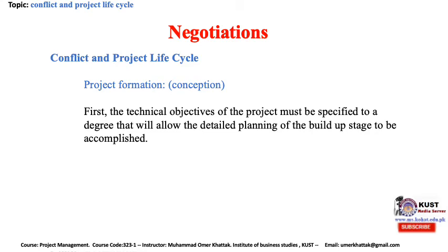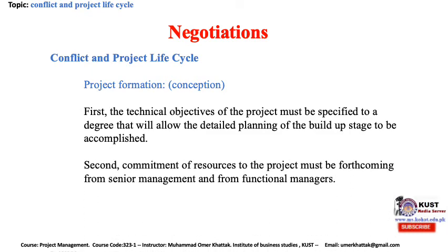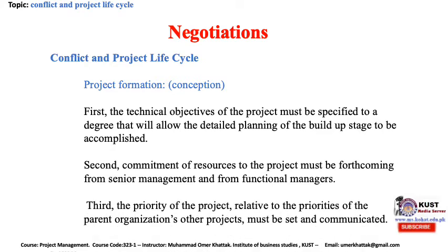First, the technical objectives of the project must be specified to a degree that will allow the detailed planning of the build-up stage to be accomplished. Second, commitment of resources to the project must be forthcoming from senior management and from functional managers. Third, the priority of the project relative to the priorities of the parent organization's other projects must be set and communicated.